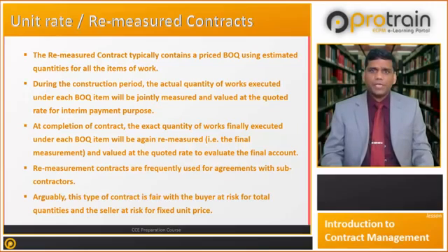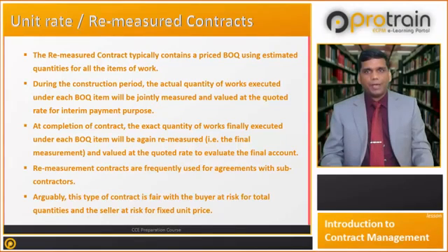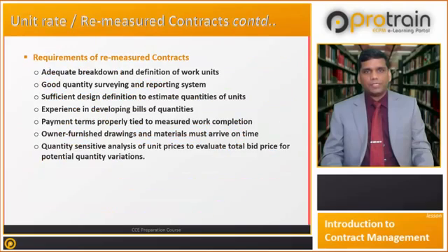Remeasurement contracts are frequently used for agreements with subcontractors. Arguably, this type of contract is fair with the buyer at risk for total quantities and the seller at risk for fixed unit price. Now let us see the requirements of remeasured contracts.